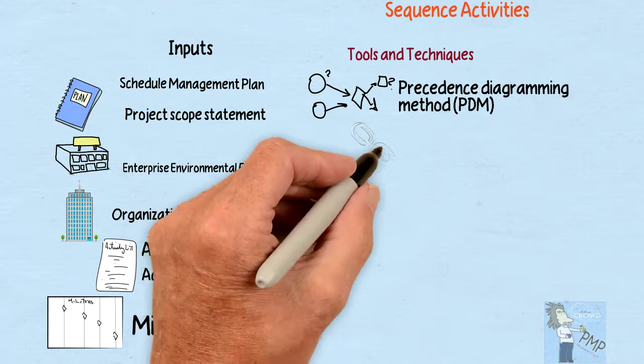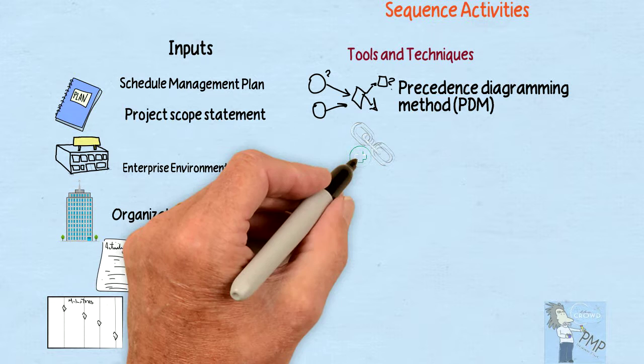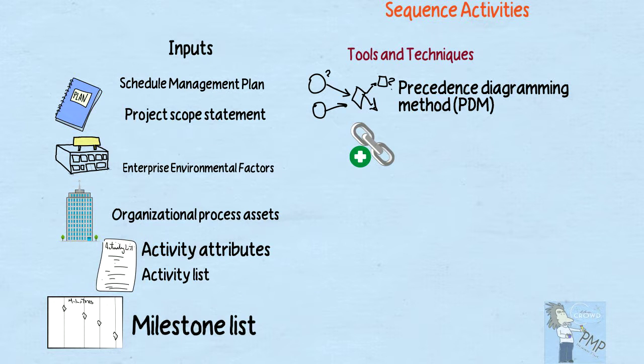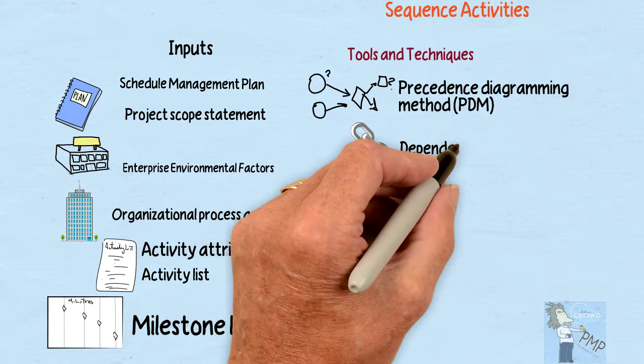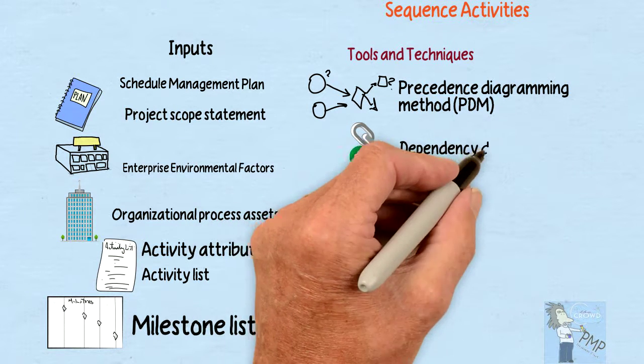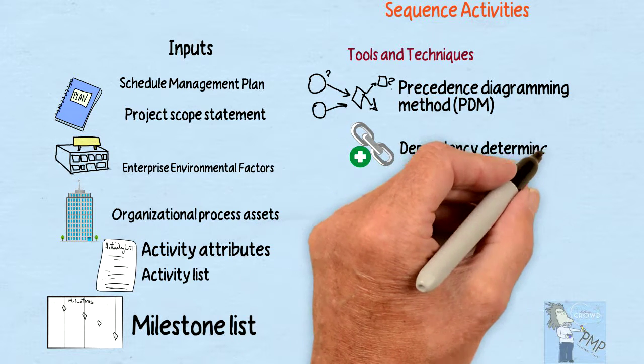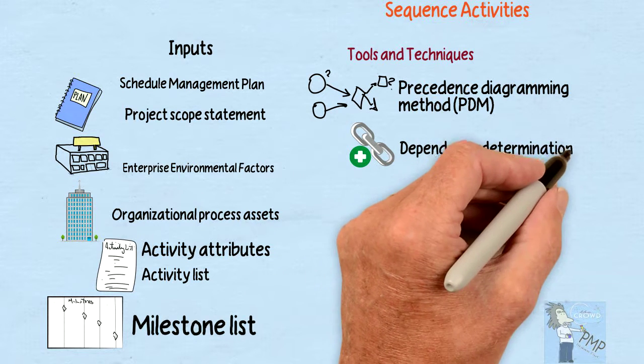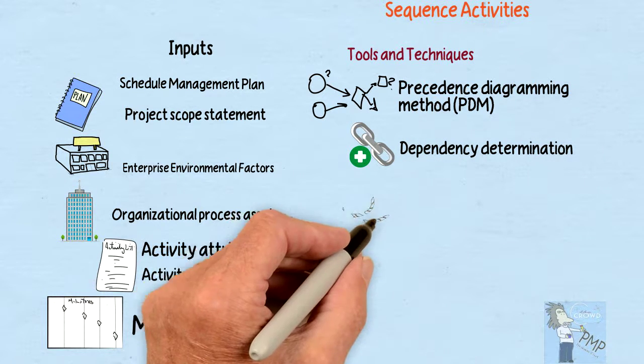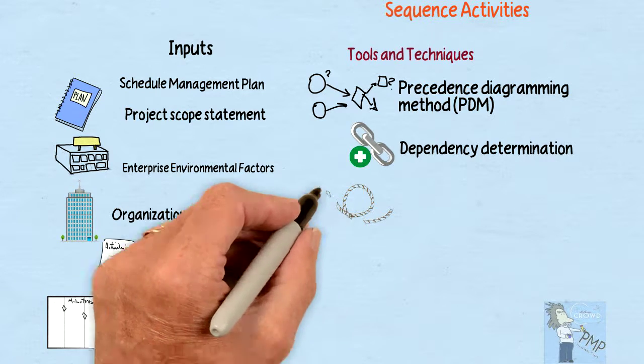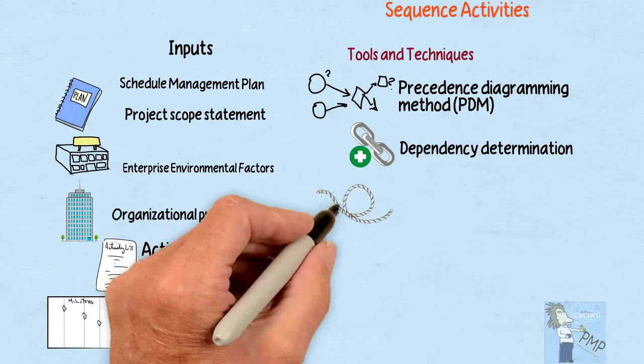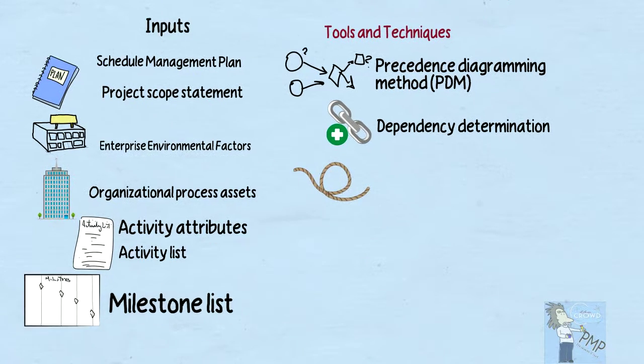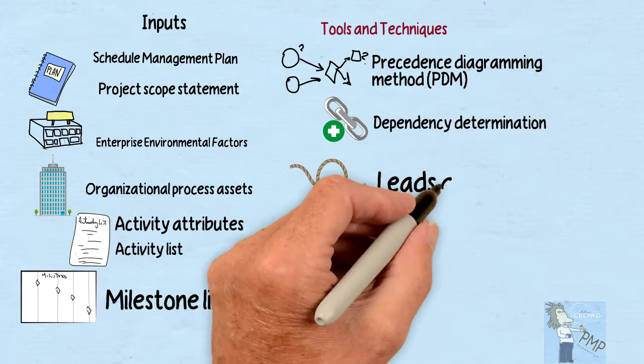We also have to think about the dependencies between them. Some things are hard-coded together where one thing has to happen after or before another, and some things are just discretionary, or we think this is the way it should go. We can also use the techniques of some slack or float, or what we call leads and lags in a project and the amount of time it takes.